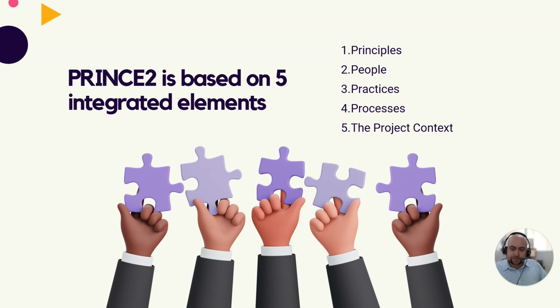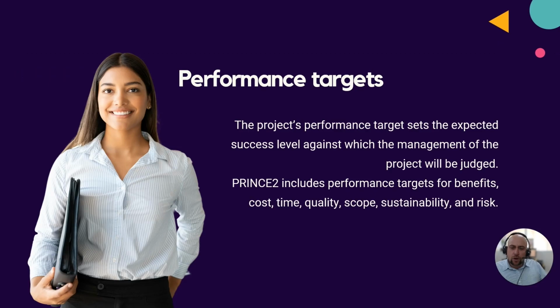Now, the next thing that I'd like to talk about is another important area that project managers and PRINCE2 project managers need to have a keen focus on, which is what we would call performance targets in a project. Now, what is a performance target, you may ask? Well, to define a performance target, the project's performance target sets the expected success level against which the management of the project will be judged. PRINCE2 includes performance targets for a few very important areas, being benefits, cost, time, quality, scope, sustainability, and risk.